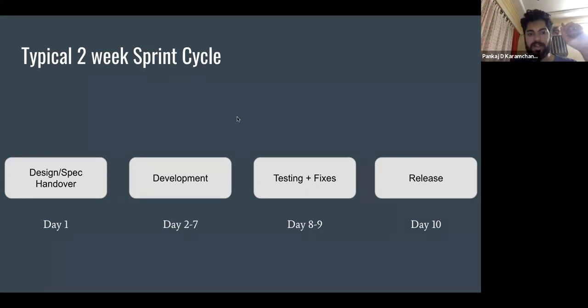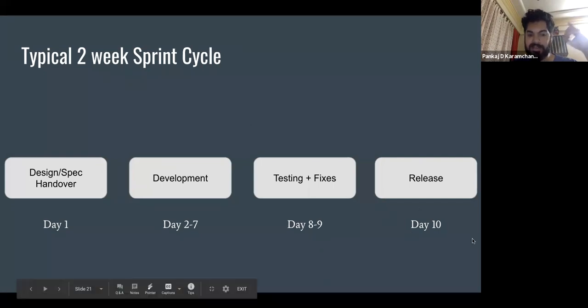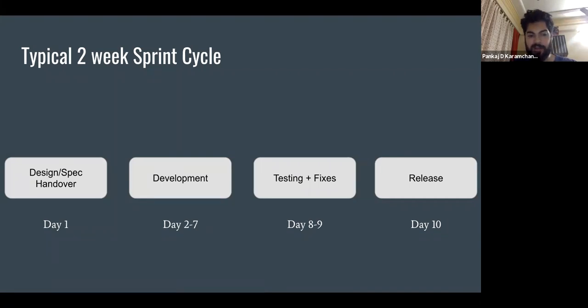So one thing to note over here, even though I'm saying 2 weeks, the days here are 10. The reason is because I've accounted for weekends as well. If you include that, then you only have 10 working days in 2 weeks.